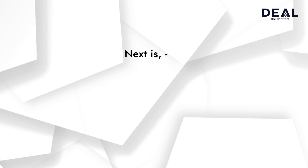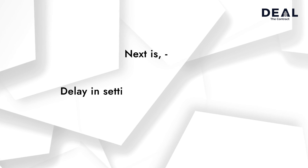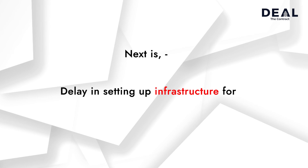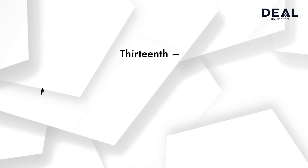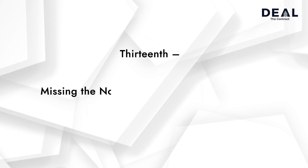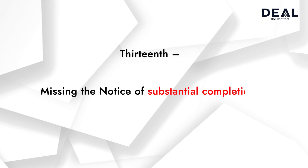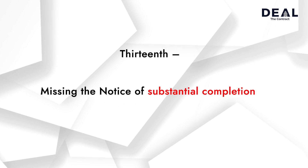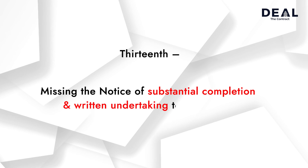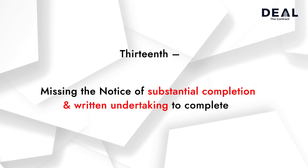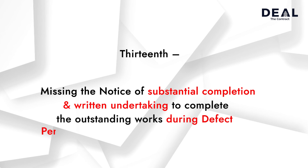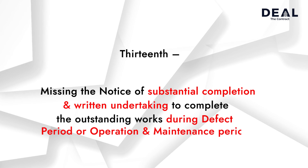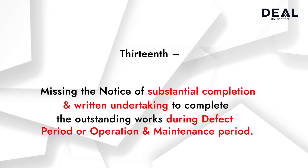The twelfth problem is delay in setting up infrastructure for the temporary works at site. The thirteenth is missing the notice of substantial completion and written undertaking to complete the outstanding works during the defect liability period or operation and maintenance period.